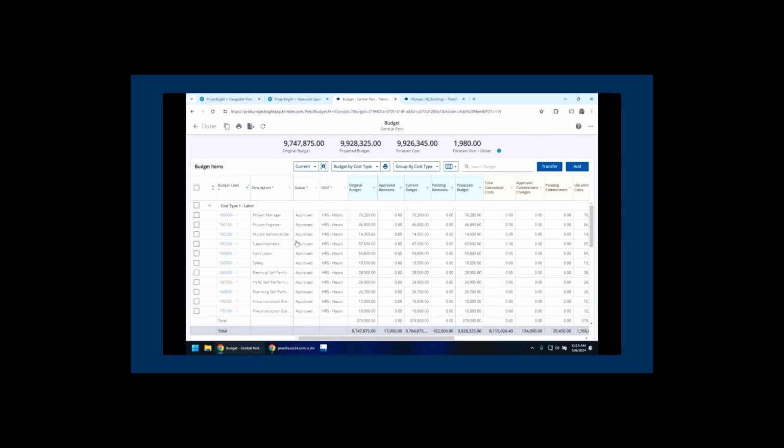Yeah, so great question. If your organization is leveraging the Vista project management module to issue subcontracts and POs, and that process works, it doesn't have to be changed. Any subcontract or commitment that's issued in the Vista ERP will be visible here. And on screen, if you'll notice as I go through these columns here, as I get past the budget columns, and I'll put a blue box around it, you can see I've got some commitments, total commitments. I'll scroll my mouse over, you can see the rest of them, but those commitments could be originated from those executed subcontracts or POs that come right out of Vista's PM module. But from that point forward, typically customers are leveraging ProjectSight to start managing the change process.